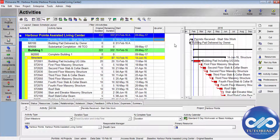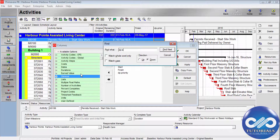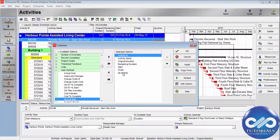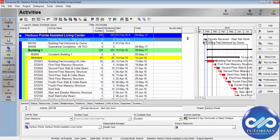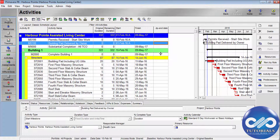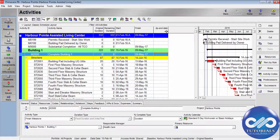Now let's work with the established user-defined field. You can create columns here — use Ctrl+F to search by 'dp' and you can see the created user-defined field. For each and every activity you can mention custom dates as per your requirement. This is how you display user-defined fields in the columns in the activity table.